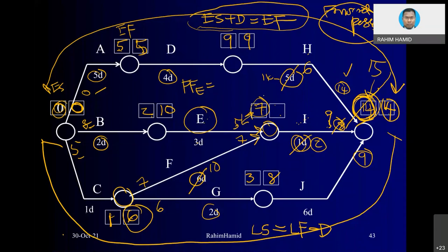If you look at this situation, the early start of I minus the early finish of E, that is the definition of free float. Activity E has 2 days that the activity can be extended, or have as free time, or even start a little bit late. They still have 2 days that they can spend or catch up.